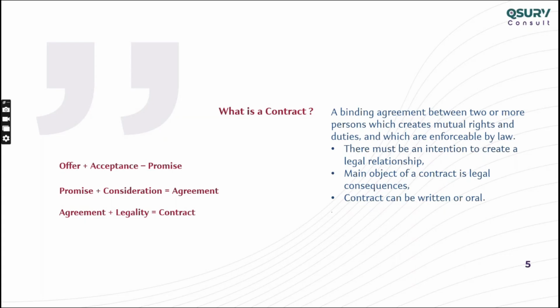So there was a promise: I told him I'm going to give you a CPD, he said yes, he's going to attend. A promise is created. Then I cleverly said, Nisar, you need to pay me 10 dirham also. Still he said yes. So a promise plus consideration forms an agreement.